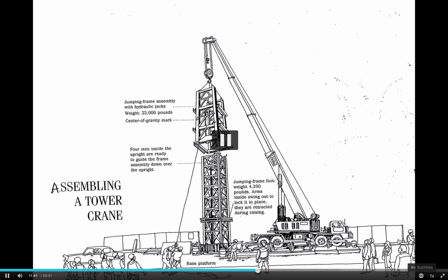And then it has a truss arm that reaches out, that picks the load, and then can feed basically any part of that site. So the typical location is somewhere near the corner of one of the sites, so that it can make the picks and bring it to the near side and the far side, and be able to feed or even take deliveries from a couple of the roadway sites.